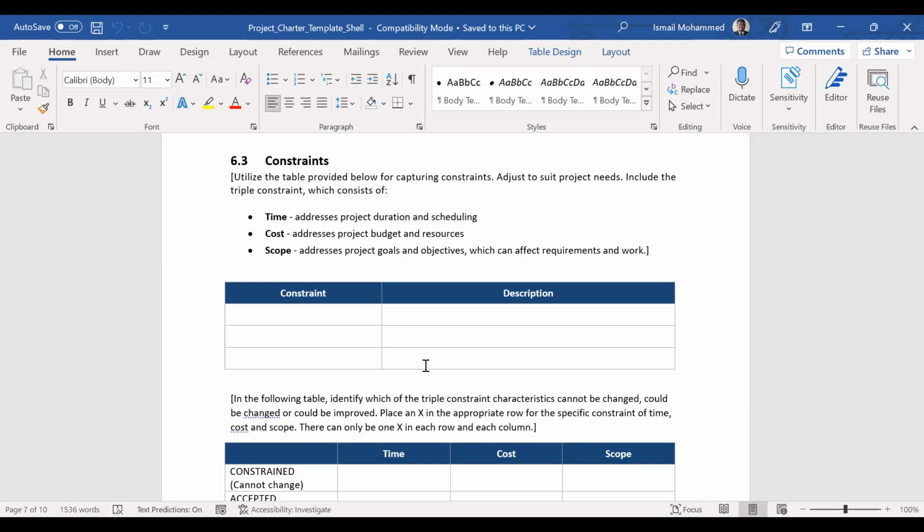So in such a case, when I'm signing off on this document, I have to be very careful that it can be amended, right? No, I will tell you, brother. This is the first thing, initial. When you are initiating the project, you will not be knowing anything. Scope will be added, scope will be removed. This is the first step on the project. You are entering into the project initiation phase. At that time, you will not be knowing the scope is going to be added or removed. Based on the statement of work, initially what you got, you prepare this project charter. Then as and when the project continues or grows, or you are into the planning phase, then there is a new requirement. Then you go and update the project charter. So the scope has been redefined. Add that scope over here and take the buyer approval.